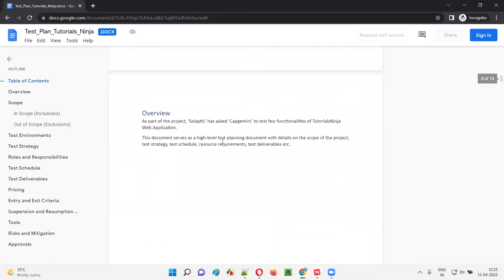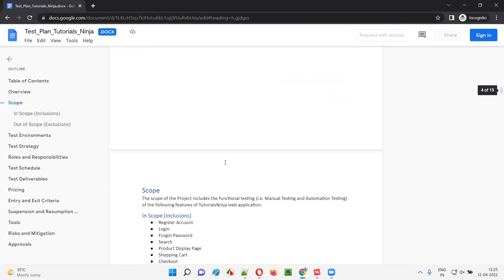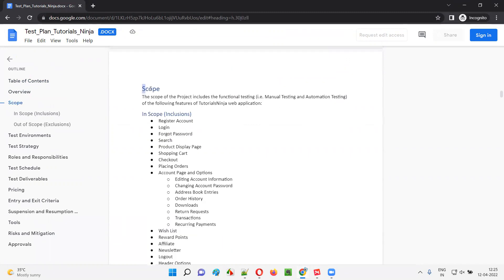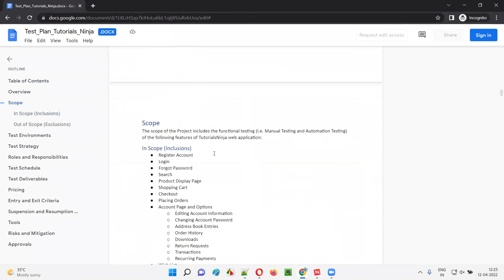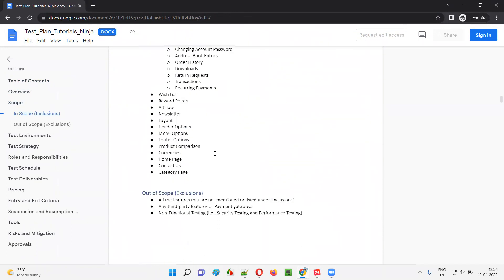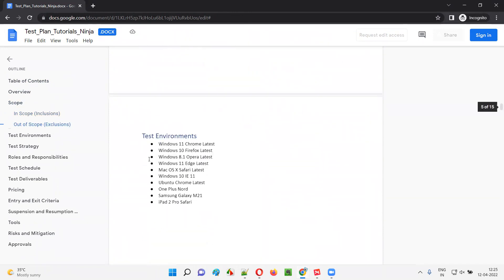So here, the first section — the first content we have as part of the test plan document — is overview, which describes about this particular test plan. Then we have scope, which is further classified into in-scope and out-of-scope, that is inclusions and exclusion functionalities. So after overview and scope, we have test environments — the list of environments in which the testing team is going to perform testing as part of this project. The third one is test environments.